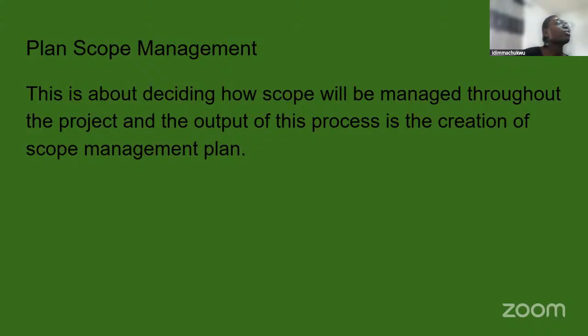The change control board is like the people that will take the final decision on what needs to be done in your project, on whether the requirement is going to be approved or rejected. After the project manager has presented the analysis, they are going to look at it and decide: if we are going to add these requirements now, do we have the necessary funds to sponsor it? How much time is it going to take for us to complete these new requirements? Can we afford that time? So they will look at it and make the final decision.